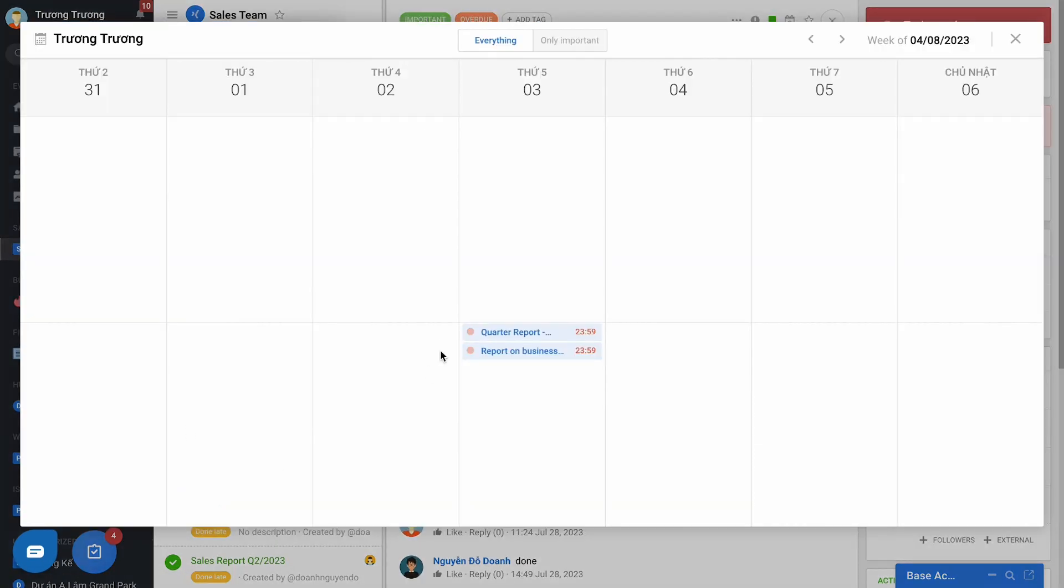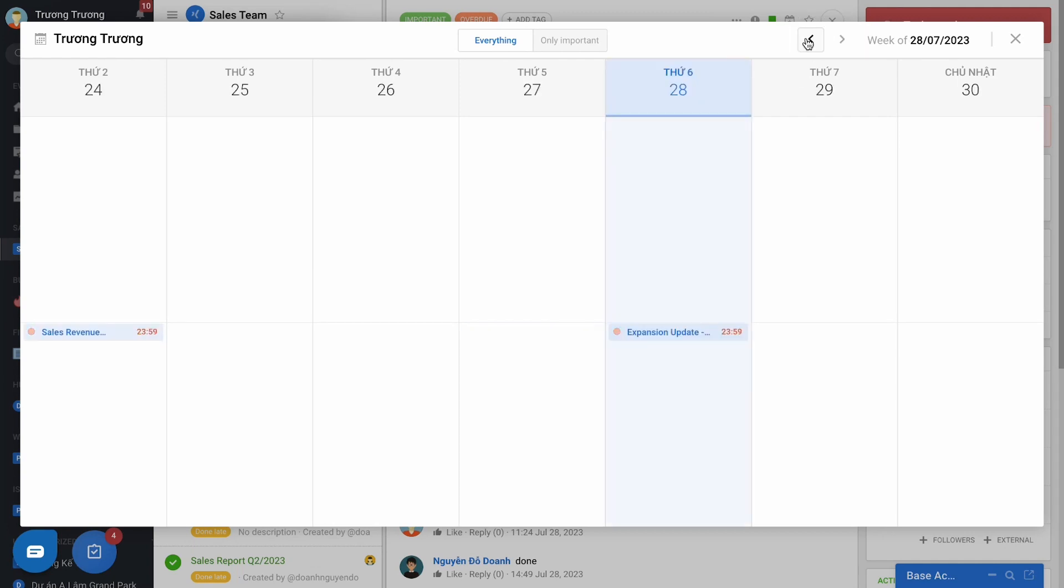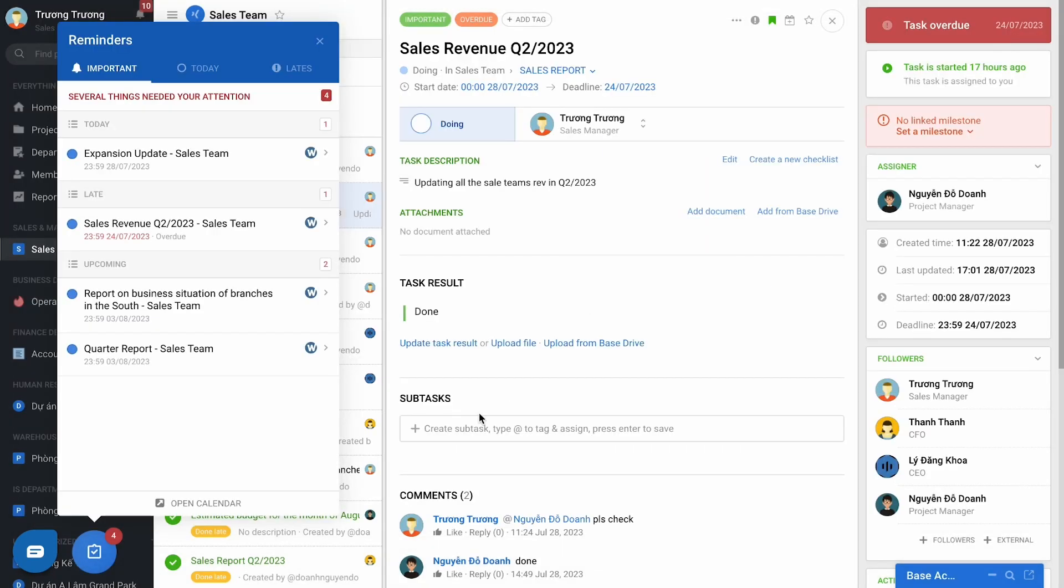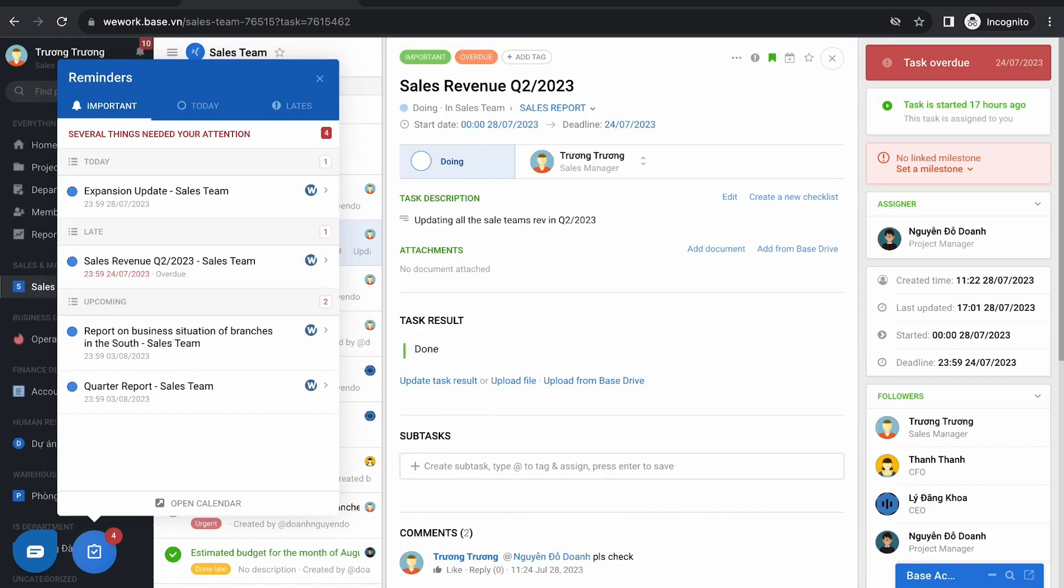Every day you do not need to go to each project or team to review your work, just check the reminder tool is okay. However, if the work is not limited to the deadline, it will not be reminded here.